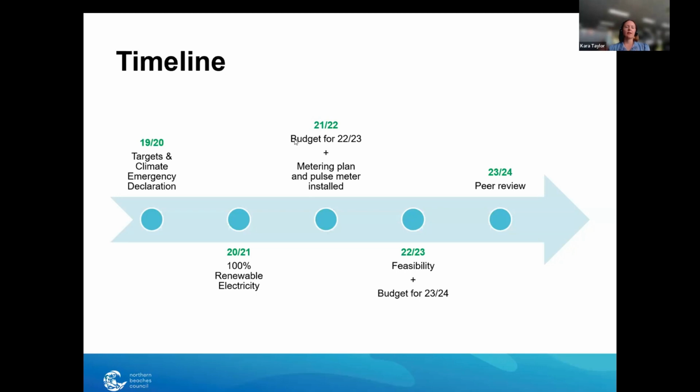meter on site. It took a little while because we had to go through our BMS controller, get quotes. They had to build a board that's Gemina requirements, specifications, that has to sit on top of it so you can send the data. Apparently it's so it doesn't blow up, so it seemed important. But we got all of that done, and all up it was about $7,000. So not too much to get that good data, but get it coming in so that you've got